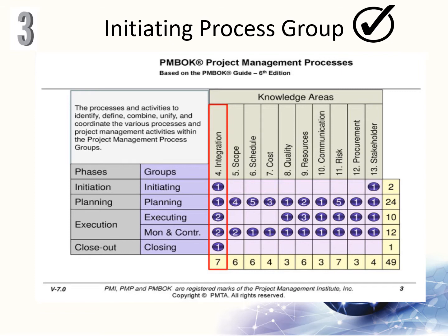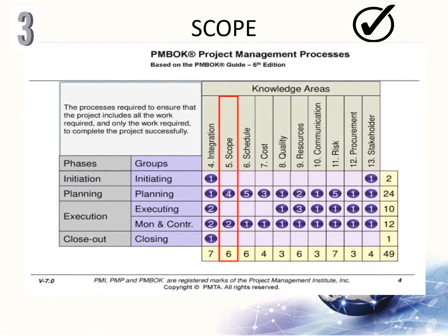So when the project charter is approved, the project becomes officially authorized. Although the project management team may help write the project charter, this standard assumes that business case assessment, approval, and funding are handled externally to the project boundaries. And a project boundary is defined as the point in time the project or project phase is authorized to its completion. The key purpose of the process group is to align the stakeholders' expectations with the project purpose.